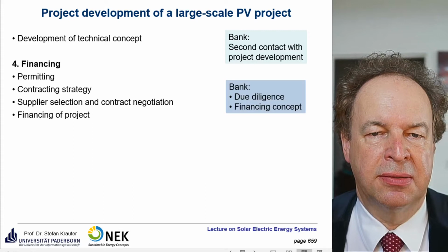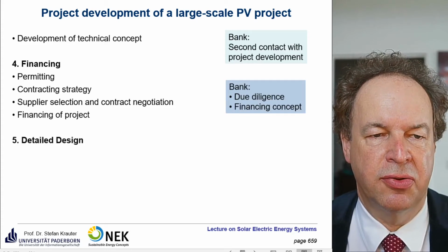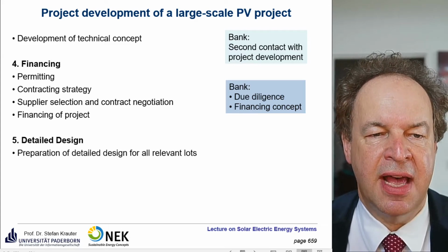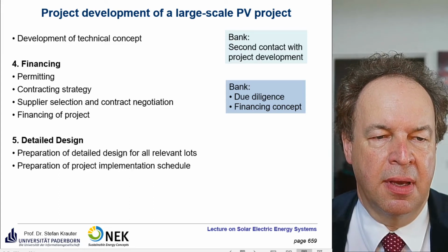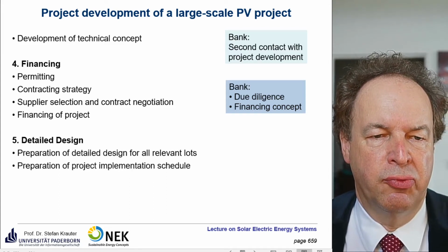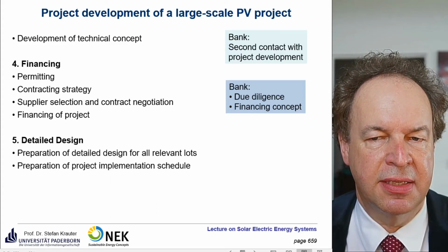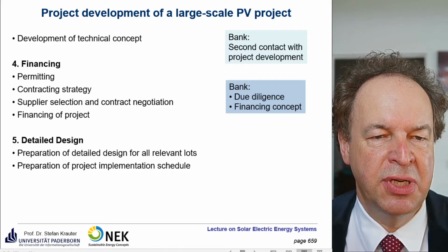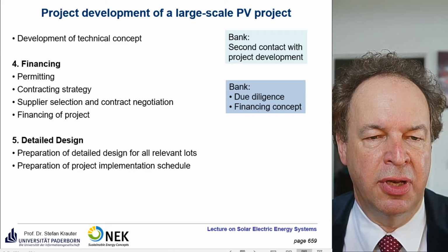So a bank wants a due diligence of the financing concept, and then we go into the detailed design. So you do an implementation schedule: how many workers you need on site, how long will it take, what do you do in summer and winter, and so on. You have to really take care of all the details.